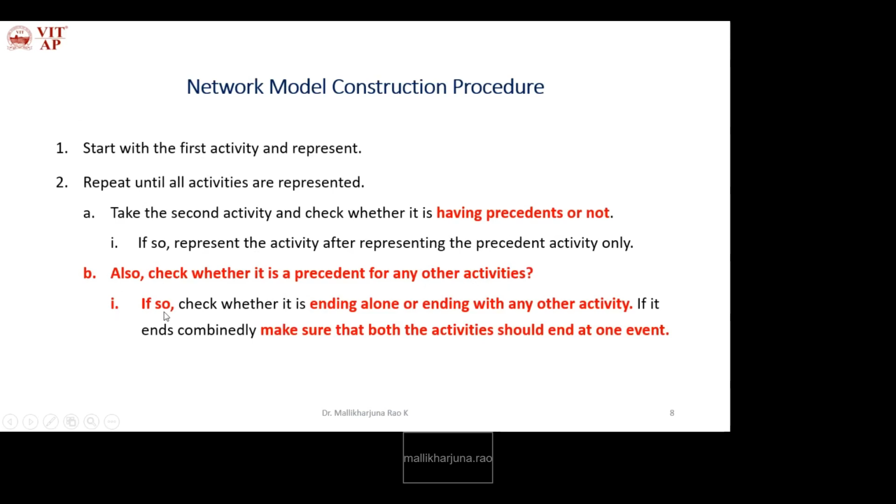If so, check whether it is ending alone or ending with any other activity. That is, when it is a precedent activity for any other activity, we need to check whether it is ending alone or ending combinedly with any other activity.